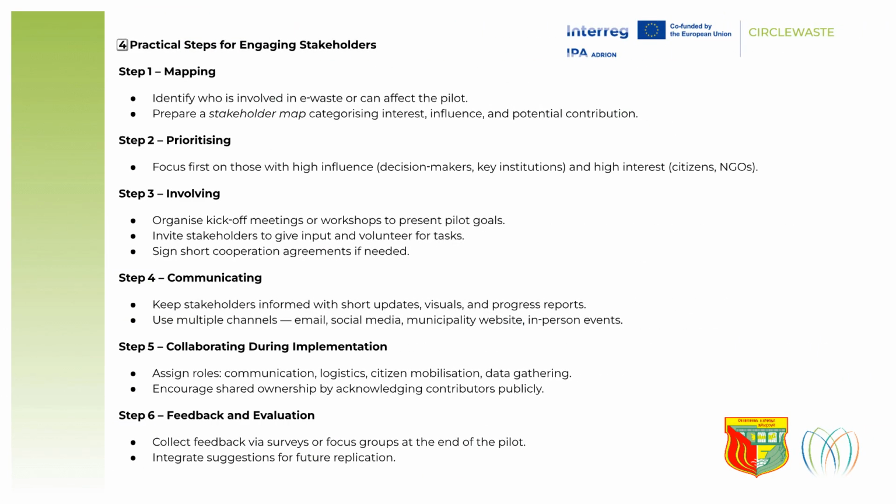Practical steps for engagement include mapping stakeholders, prioritizing those with high influence, involving them early through meetings, and maintaining communication with regular updates. Collaboration during implementation involves assigning roles and encouraging shared ownership. Finally, collect feedback for evaluation and future replication.